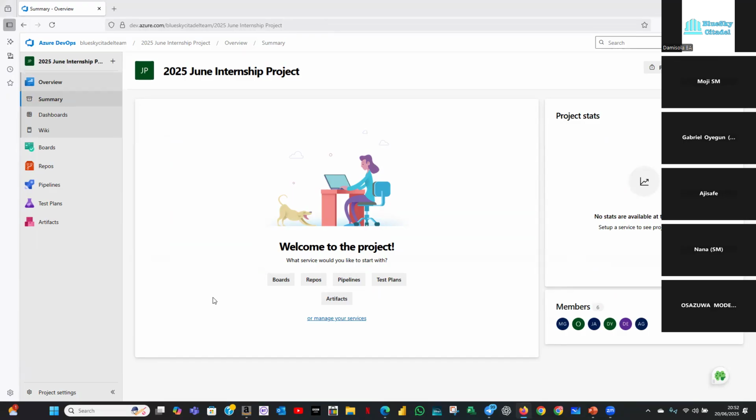If you do that with the Scrum, that means every single team that uses that process will start having the same thing you've configured, and they might not need it on their own project. And they might also configure some things which you don't need on your project. So you start seeing some things and you're wondering, where did this come from? We don't need this. Why is this there and everything and all that? So in order to save from doing that is why we do the inherited process. And what the inherited process means is that you're creating a branch out of Scrum, which is just suited for your project and the customization you do.